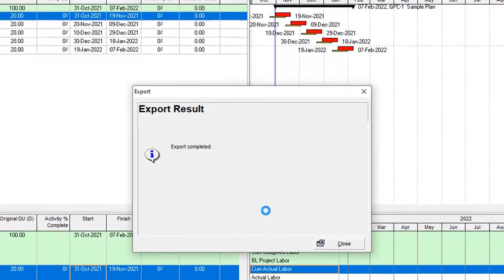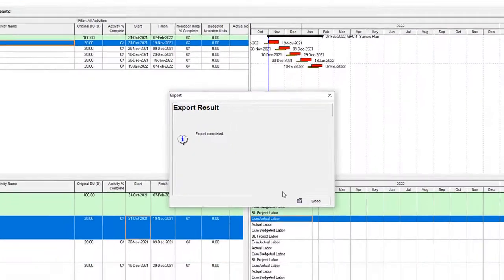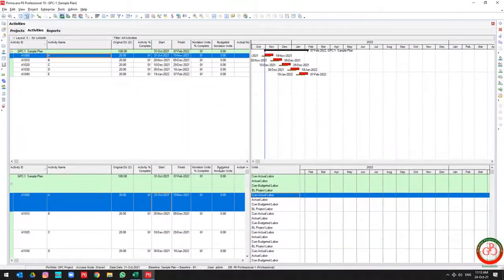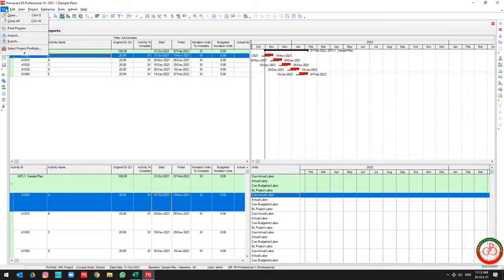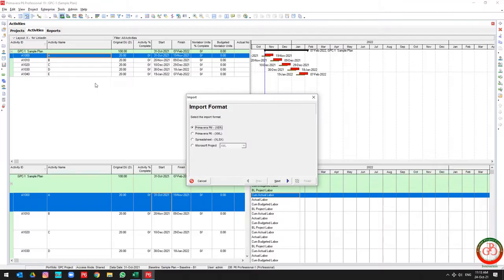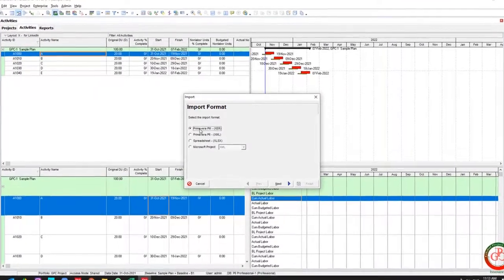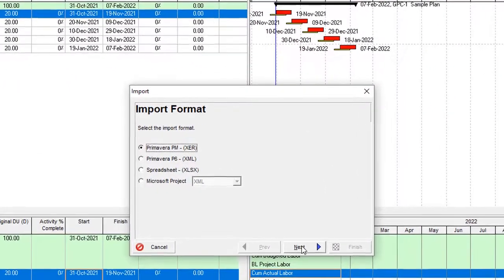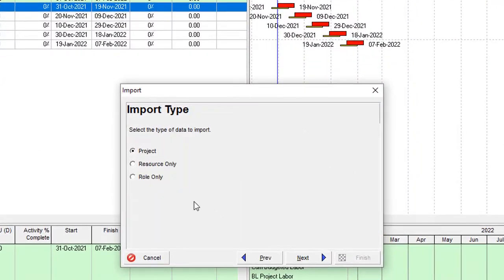It takes a little bit of time, but with this method you can export the project with the baseline simultaneously. Now let's check it by going to import the XER file.